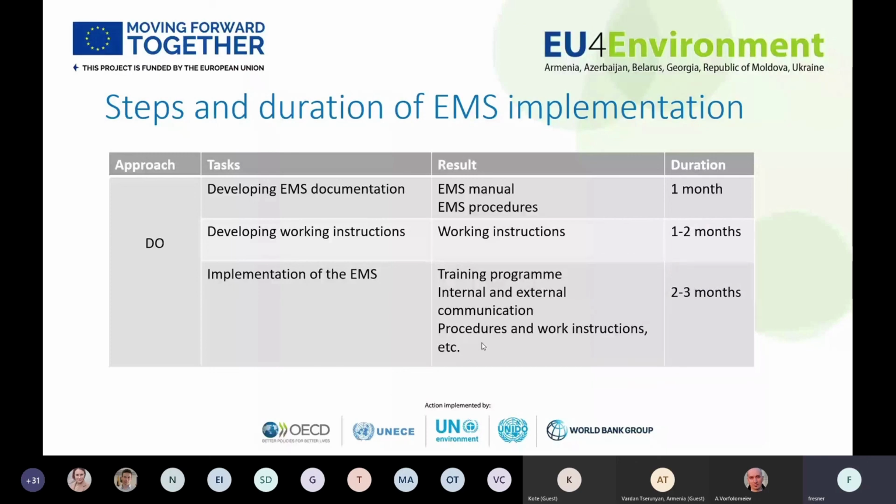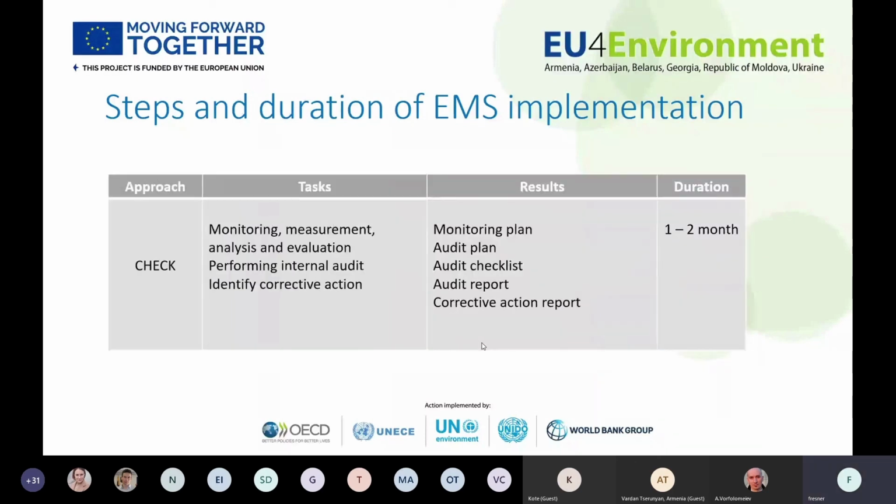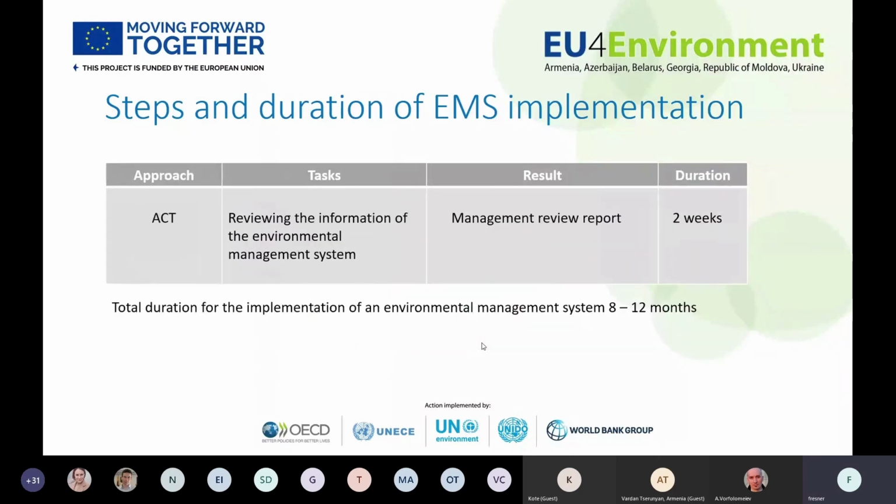And then implementing, including training, communicating internally, probably at least 2 months more. Installing monitoring and measurement, at least another month, and then the internal audit and a management review, another 2 weeks. So we end up with serious work. For Zota, it took a little bit more than 8 months.